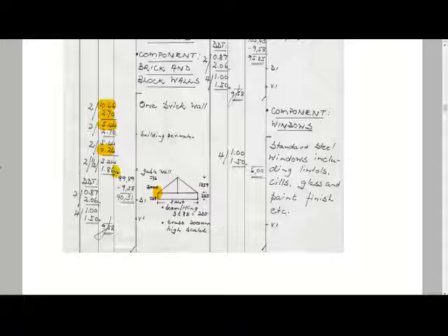And then you will see here's the calculation for the gable end. There are two little stripes, and there's the description for your gable end or gable wall, and they calculated that the height of your gable wall is 1.86 meters. So that's your height there. Your formula is half of your height times 5.44, and you've got two of them on either side.